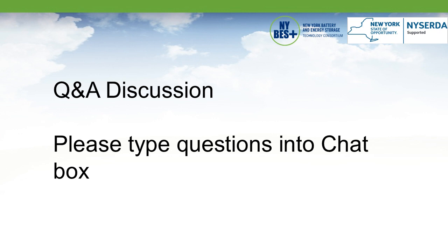Very good. And then we also got some questions about small systems, residential 20 or below 20 kilowatt systems, and you outlined the difference in the SAR. Maybe you could expand upon the difference in treatment of say a 20 kilowatt system versus other systems. So for a small residential energy storage system, we're looking at it following the same process as the existing fast track expedited process for DG, unless it comes up to a threshold where there's a control mechanism that would be needed. It would just follow the existing fast track under 50 kW process.